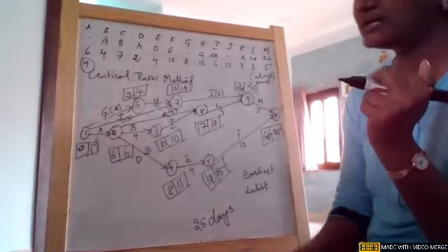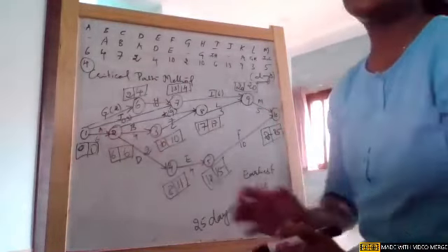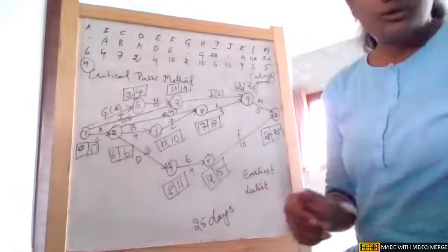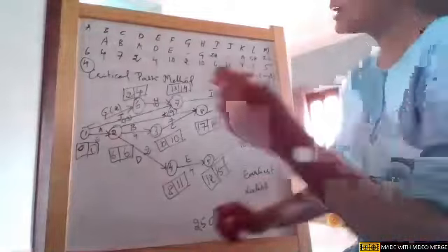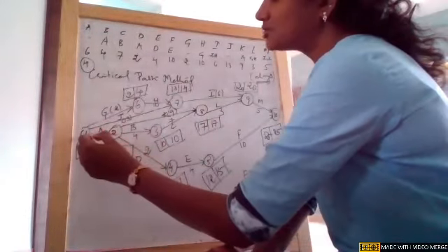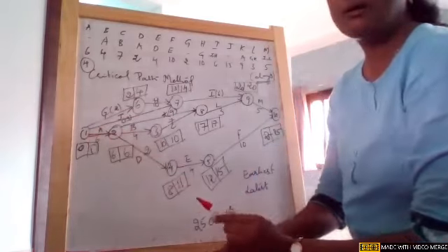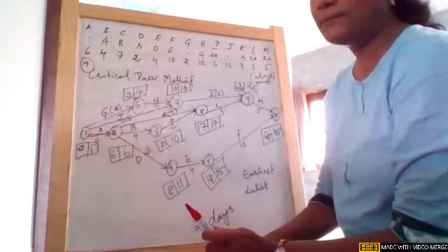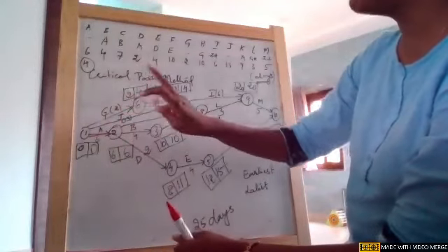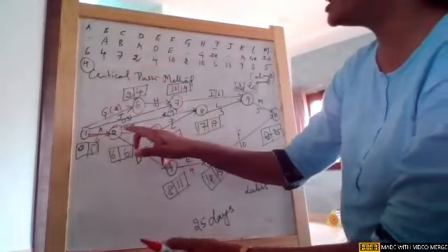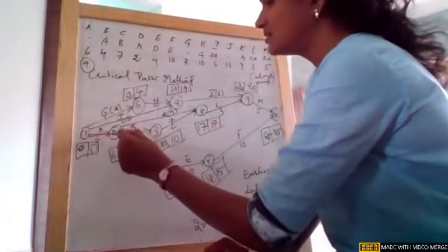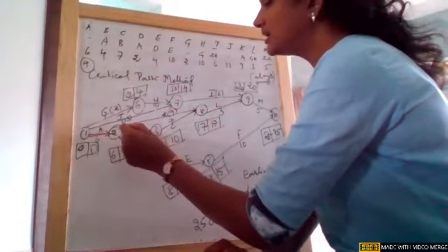So now how do I arrive at the critical path? Wherever the earliest and latest times are the same, you need to show a double line for that. Okay, now if you see 0 and 0 both are same and 6 and 6 both are same. So draw a double line here. Okay, so that is one part. And now come to the next one. If I see 6, it is having different durations, 7 different durations. 8 is having same duration, 3 is also having same duration. So there are 2 critical paths for this.